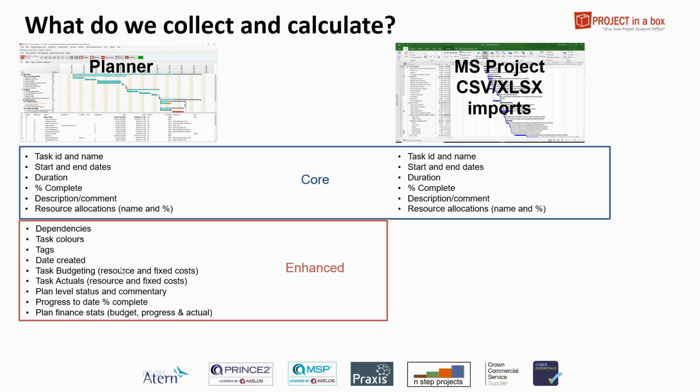And then we also calculate some plan finance stats, so totaling up all those budget and actual costs, and also calculating a progress cost for you based on percentage complete of those tasks. So some simple earned value type measures coming from that data, all done for you automatically.